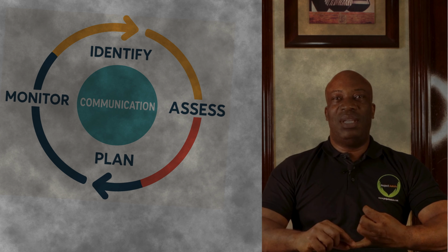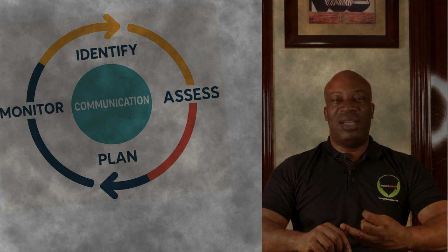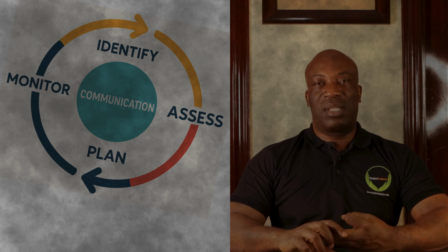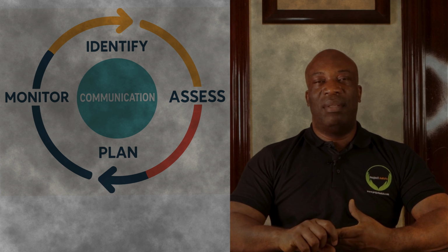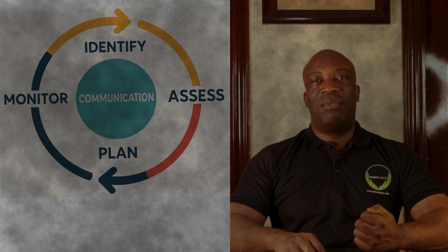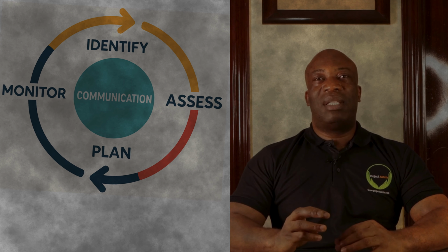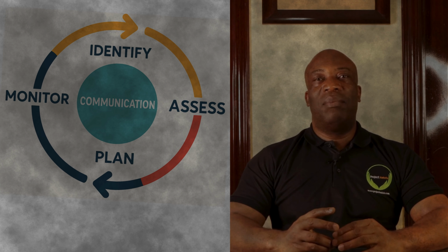So, in order for you to appreciate what the risk cycle is, I'm going to take you through all the stages that you require to understand and appreciate a risk cycle. In this video, we are covering 6 stages of the risk cycle. The first stage is going to be identification. The second stage is evaluation or assessment. The third stage is identifying the responses to risks. The fourth one is selecting the responses to risks. Then the fifth one is planning and also resourcing for that risk. Then the last one, but not least, is implementation and also monitoring of the risk.